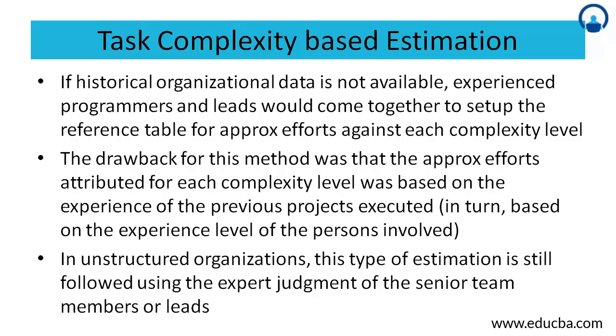Now the drawback for this kind of method was that the approximate efforts attributed for each complexity level were based on the experience of the previous projects executed. That in turn would be based on the experience levels of the project leads or the senior programmers who had worked on similar types of projects and technologies, and that data gets refined and fine-tuned.